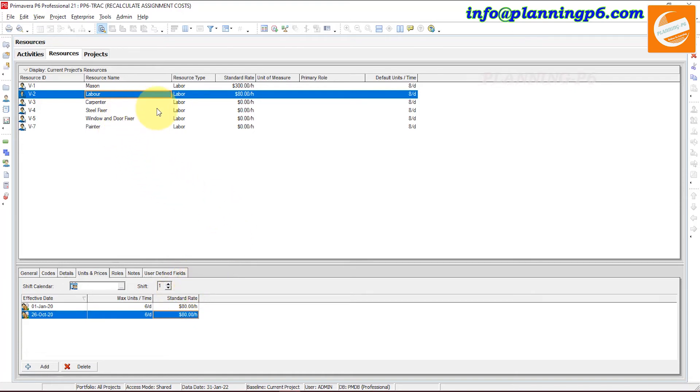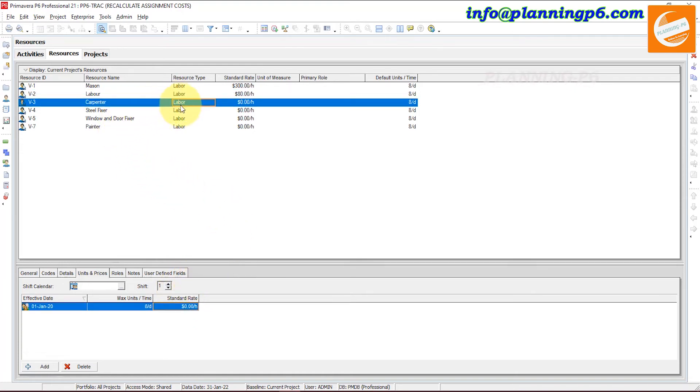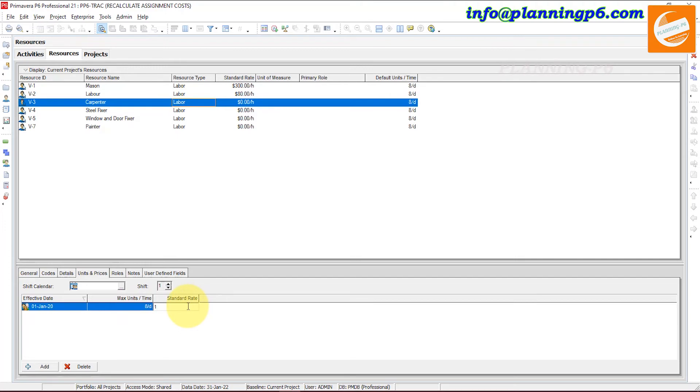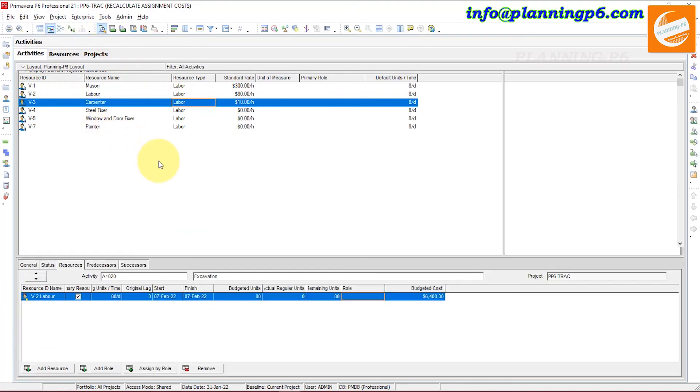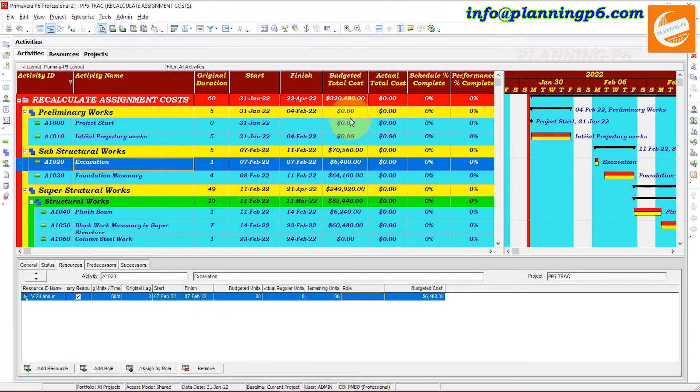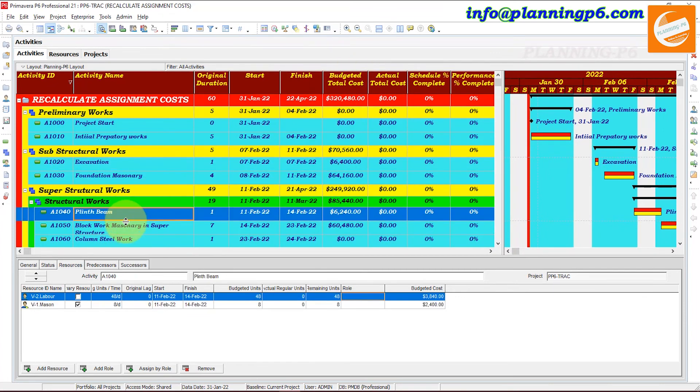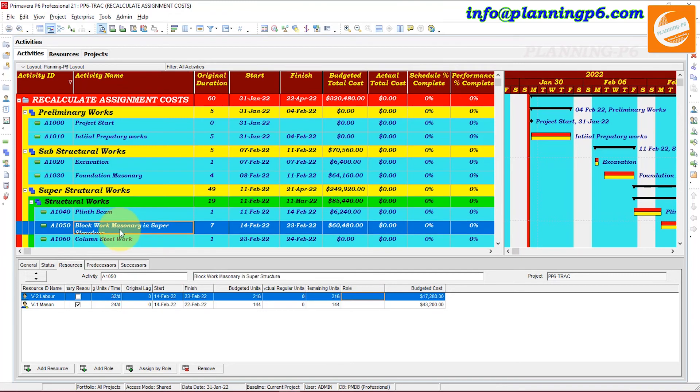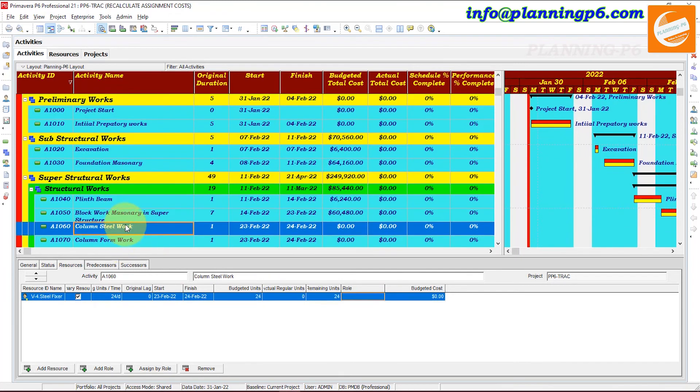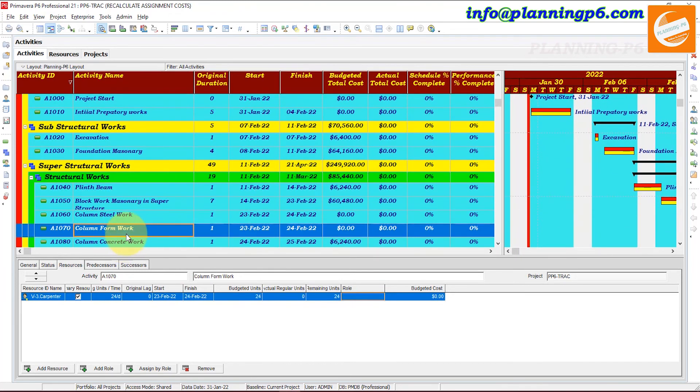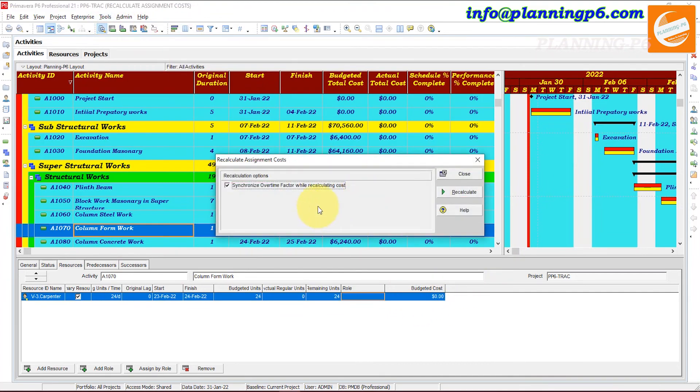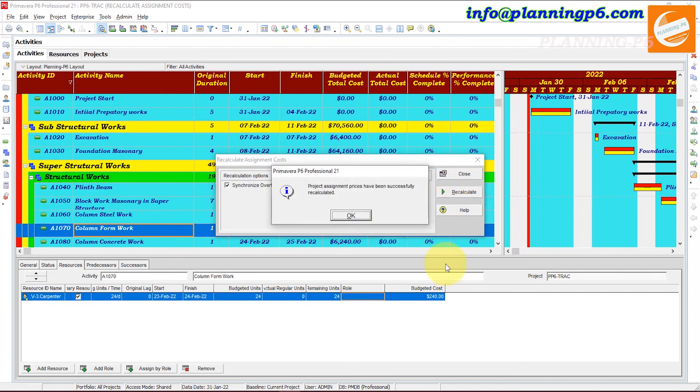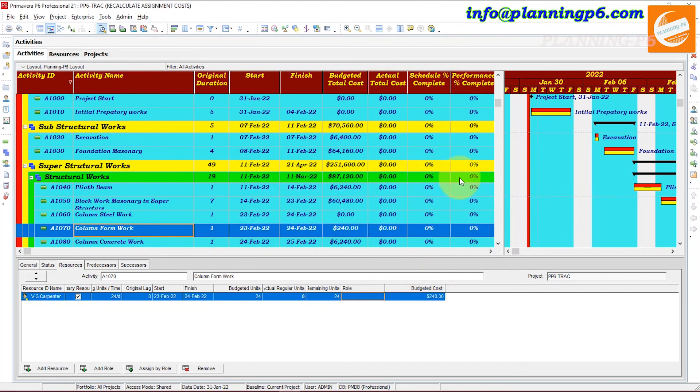So if there is a carpenter resource, then it is also a labor resource. Maximum unit remains the same, 8 hours. Then it has no cost. Then we will assign suppose 100 dollars per hour, or you can say 10 dollars per hour. So in the activities, just focus on the total budgeted cost and where the carpenter is assigned. We will see that specific activity as well. Homework, here the carpenter is assigned. Budgeted cost is now zero.